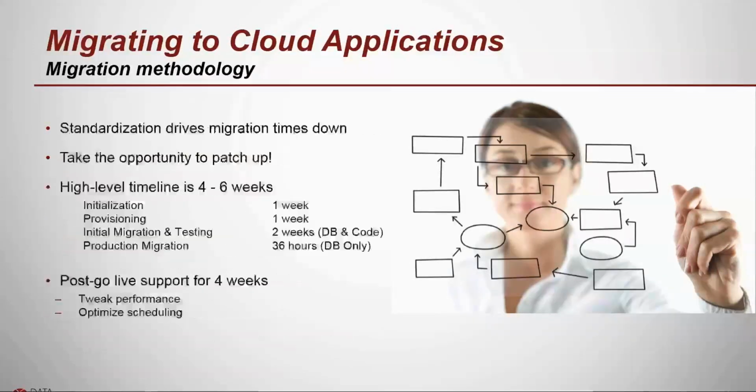From a testing standpoint, and we'll talk a little bit about this with Kim, there are a number of different areas that we have customers go through, and that includes workflow, customizations, printing, things like that that are more technical in nature. Typically during a migration, we're not applying a significant number of functional patches, so there isn't a lot of end-user testing that has to get done, but most companies will go through some level of end-user testing, similar to what you would do for a critical patch update.